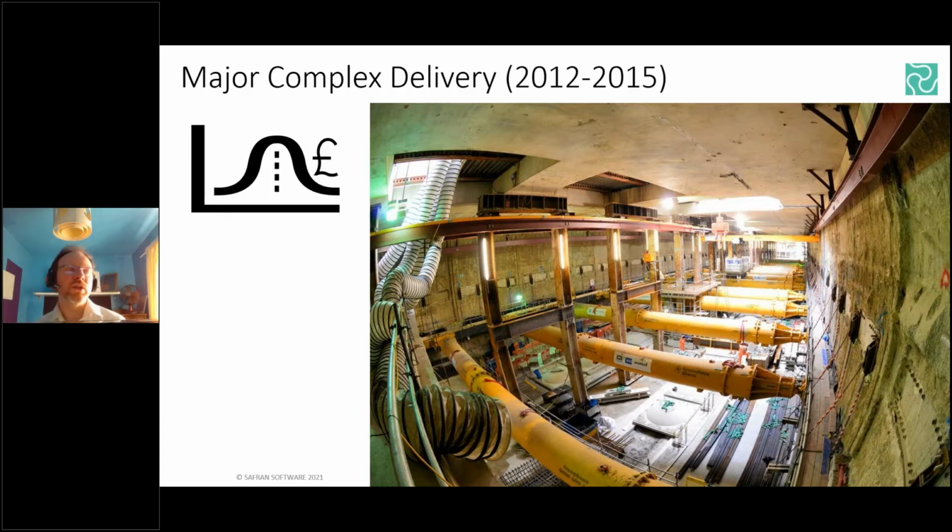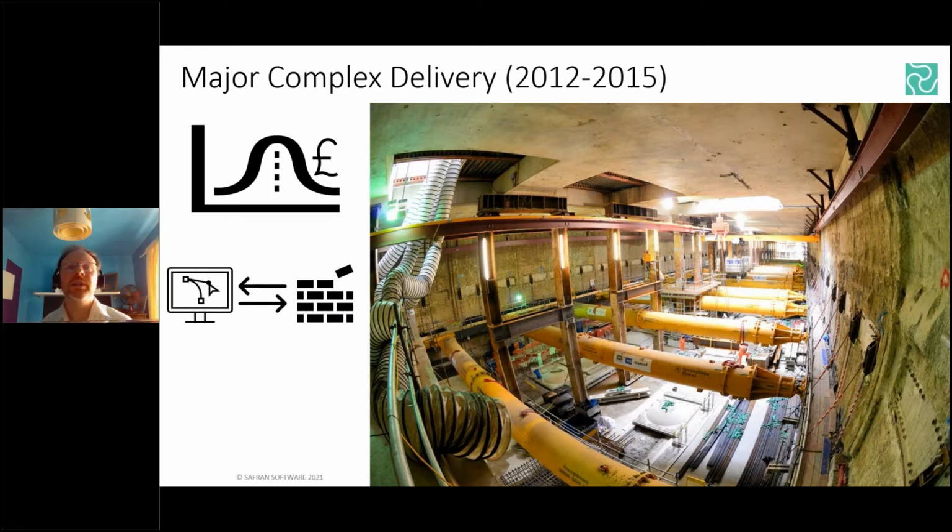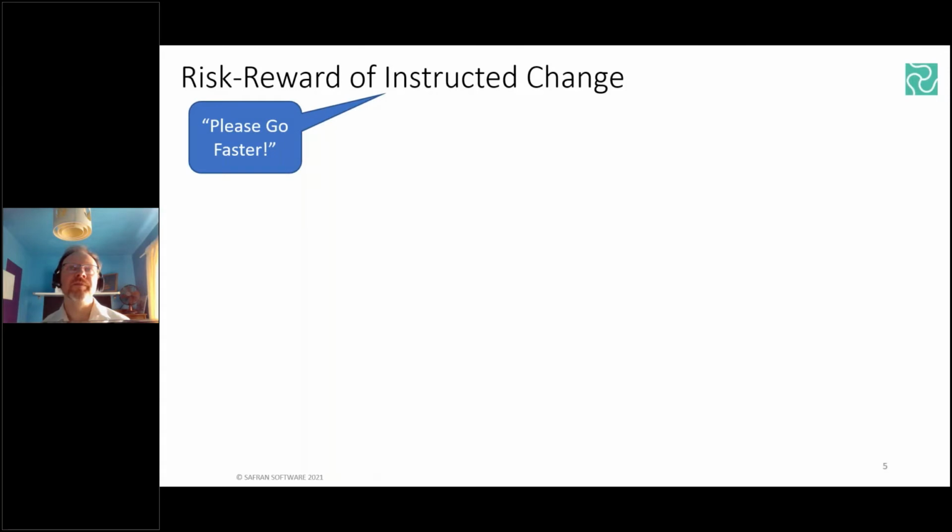time-independent additional costs. But now it was becoming painfully obvious that there was much greater exposure to unintentional second and third order consequential impacts. Or to put it another way, the potential feedback loops where events out on site can trigger redesign or resequencing of the other parts of the design and build project. So there's this potential for amplification or domino effects, compounding costs due to impacting risk events, but also, if we're being quite honest, the administration of formal and informal instructions.